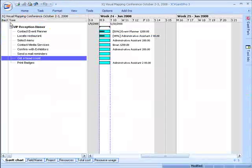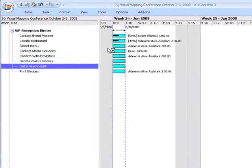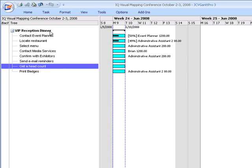I'm going to go back to JCVGantt and you'll notice now that each of my tasks takes one day. We're going to change that in a little while. I also want you to notice the VIP reception dinner, which is a summary task, and that is cumulative and will tell me how many days my entire project will take.